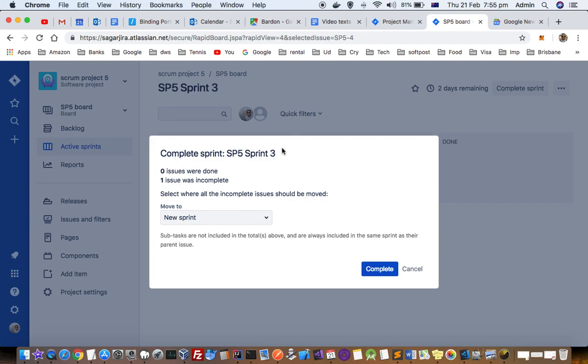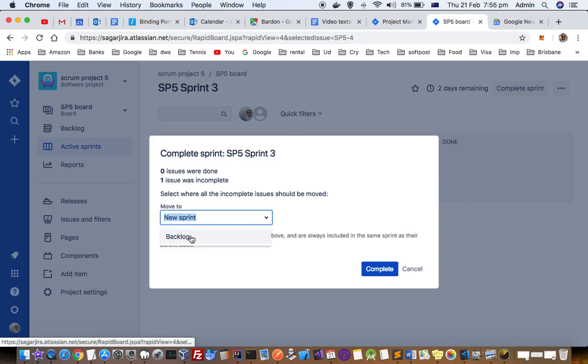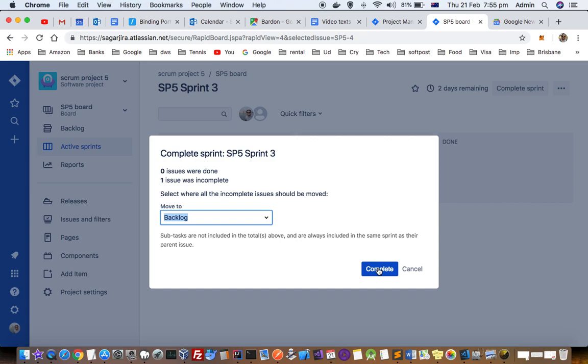But still, if there are some incomplete issues and you want to end the sprint, we can move these tickets that are not completed into the backlog and then click on complete the sprint. That's how you can end or close the sprint. Thanks for watching this video.